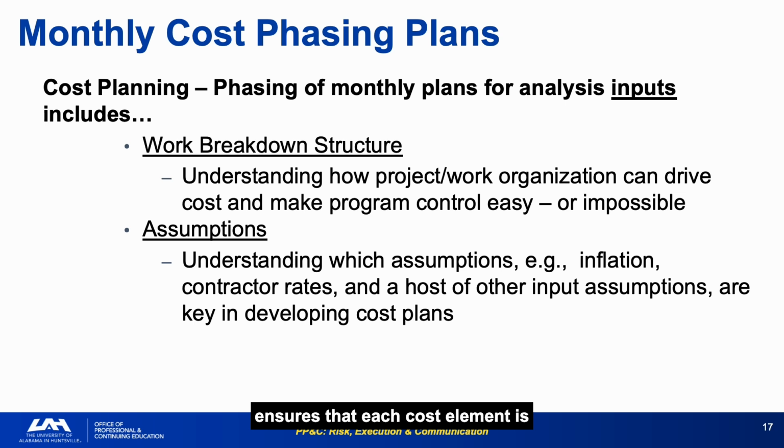WBS-based phasing ensures that each cost element is traceable to a specific deliverable, which allows variance analysis to identify not just that a cost is off, but where in the program the deviation is concentrated. Document your phasing assumptions in a companion note to the cost plan. When the plan needs to be revised, the assumptions are your starting point for understanding what changed.